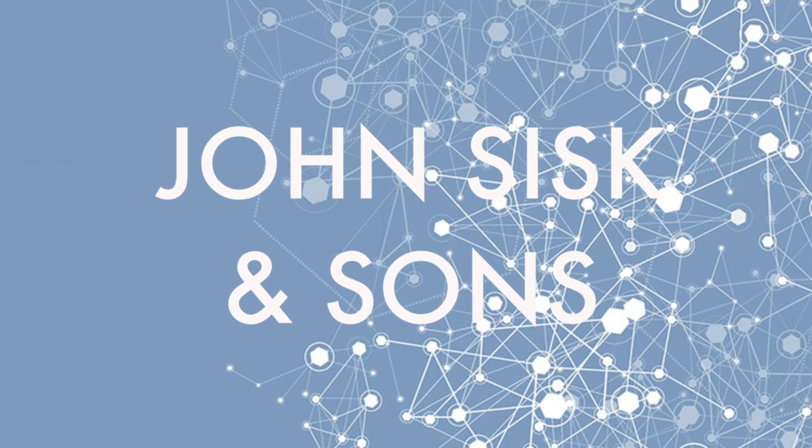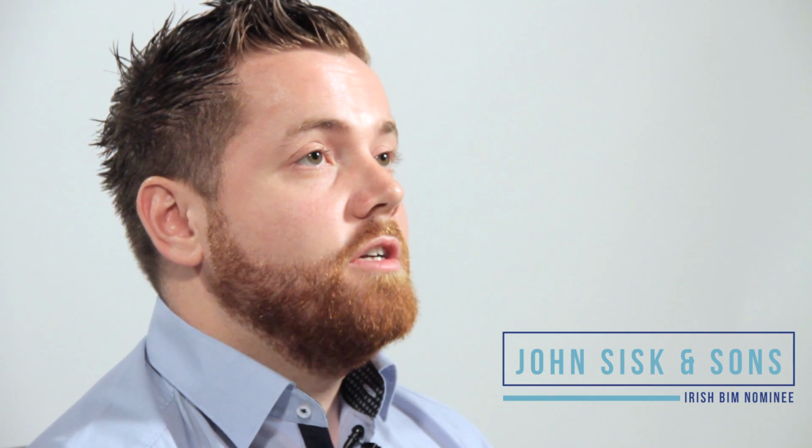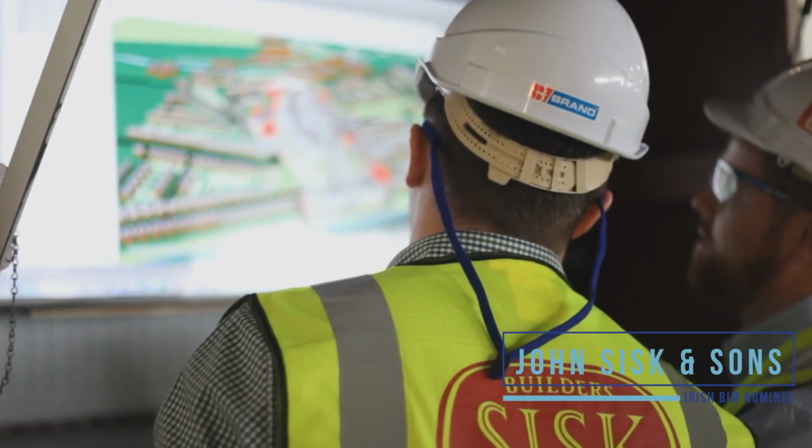So my name is Killian Kelly. I'm with John Sisk & Son. The main challenges on this project was to ensure that the full project team had the BIM capabilities to carry out the client requirements. We carried out a BIM assessment across our supply chain, and with our long-standing relationship with the majority of our supply chain, we could ensure that we could meet the BIM requirements.